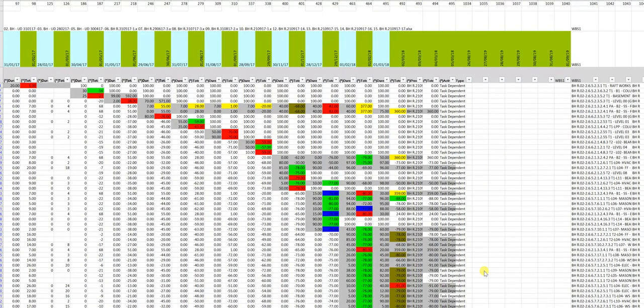The dynamic critical path is calculated from the as-planned for activities still to complete to the right of the data-date line, and therefore they are theoretical statements and not factual statements. As they are theoretical statements, not factual statements, the as-planned, the as-built critical path needs to be established.